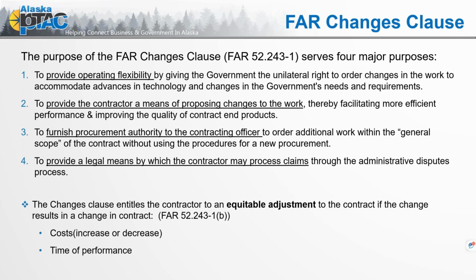One, it provides operating flexibility by giving the government the unilateral right to order changes in the work to accommodate advances in technology and changes to the government need and requirement. So here's the benefit for the agency, operating flexibility. Two, it provides the contractor a means of proposing changes to work, thereby facilitating more efficient performance, improving the quality of contract